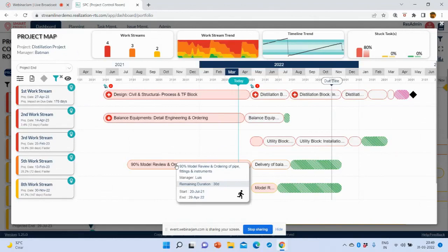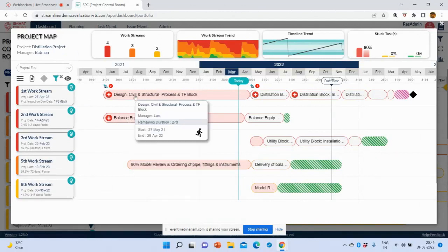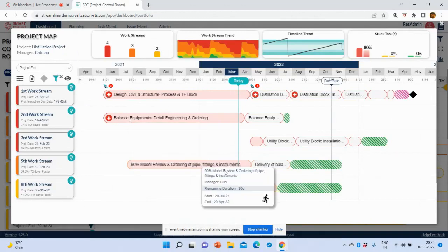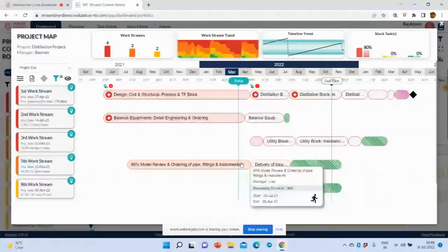Let's assume 3 of them require, let's say, 30 engineers, and we only have 20. So what the system is saying is, then sacrifice this. Make sure these 2 are fully loaded so that the speed of these boxes can be maximized. We still have a lot of feeding buffer to absorb the delay if this starts a little bit late while we are trying to mobilize more engineers to take up the entire scope.